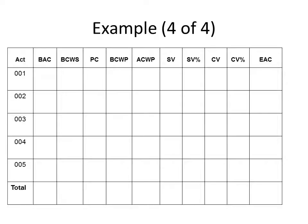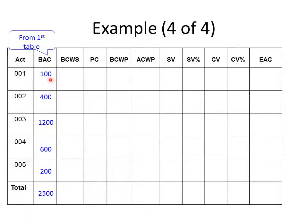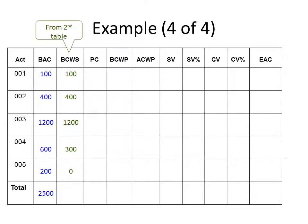Now we use the actual reported site data to complete our earned value analysis and estimate the final cost of completion based on progress by end of month four. The first column in the EVA table is budgeted cost of work — for activity one this is $100,000, and the total original cost plan for the project was $2,500,000. We also load the budgeted cost of work schedule column based on the original cost plan through month four.